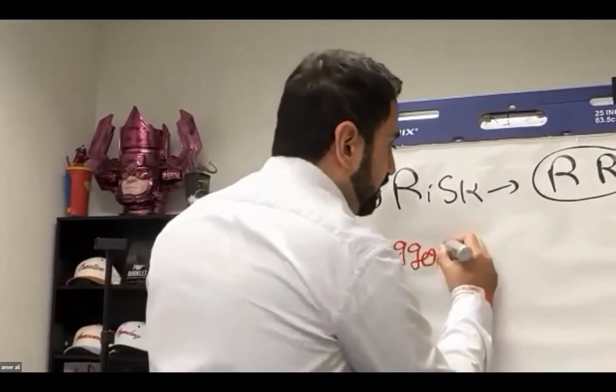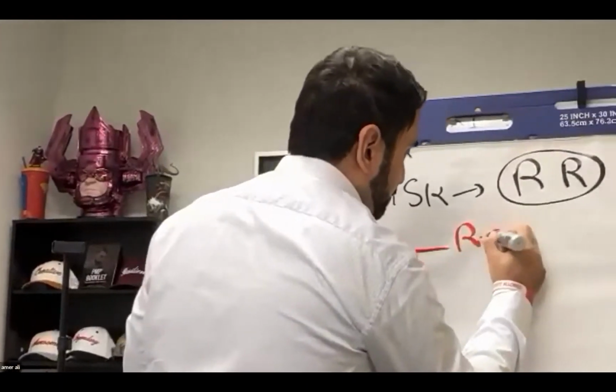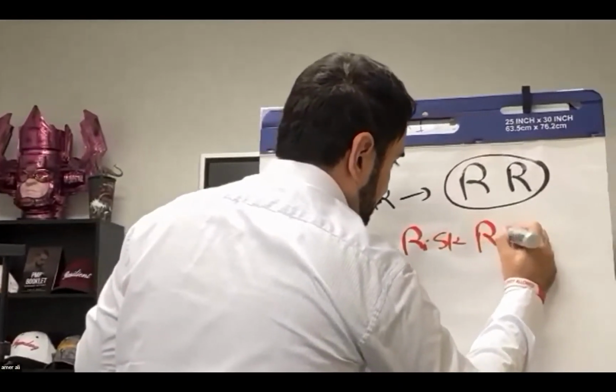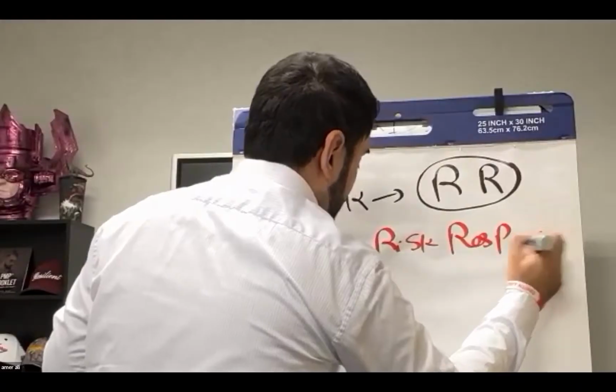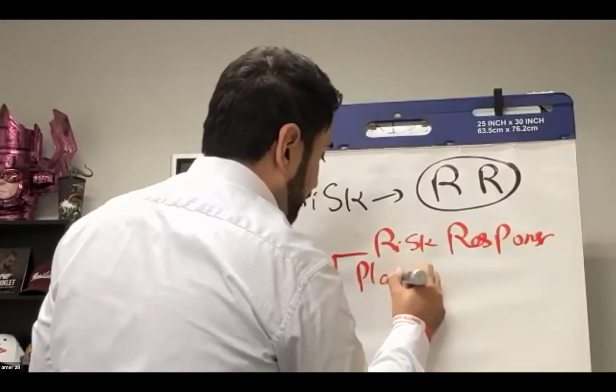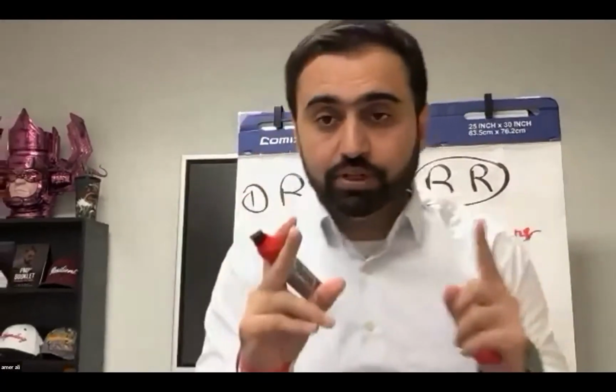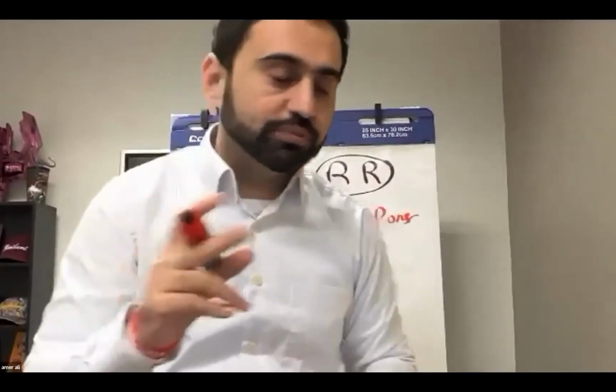A trigger happened. He agreed on the risk response plan. No change request is needed because it was already planned. He will implement the risk response plan.